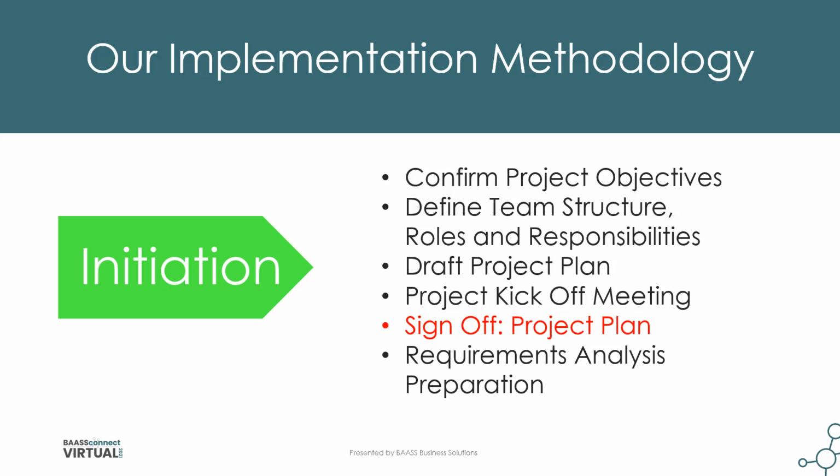In our initiation phase, this is the time when we finalize the sales proposal, we will confirm the project objectives, we will define the team structures, their roles and responsibilities. We will draft a project plan. We then present a kickoff meeting that includes all team members of the project.